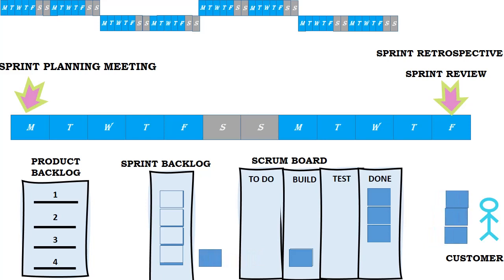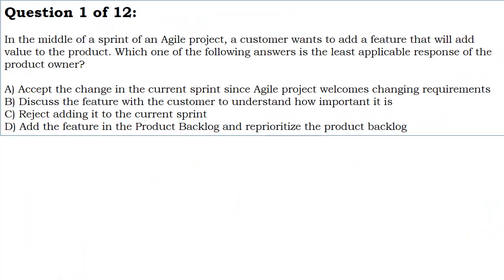Backlog refinement. In the middle of the iteration, the product owner often works with the team to prepare some stories for the next iteration. The purpose of these meetings is to refine enough stories so the team understands what the stories are and how large the stories are in relation to each other.